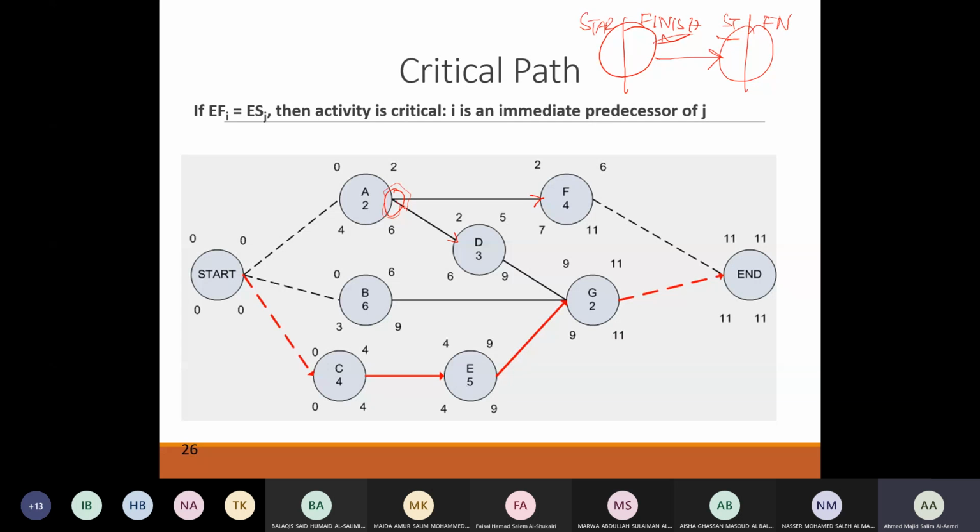Now, this is one of the disadvantages of a Gantt chart, that it allows you only to have one relationship, which is finish to start. If you allow for other relationships, your plan is going to be a little bit faster, and we are going to learn what's the meaning and how to make it faster.